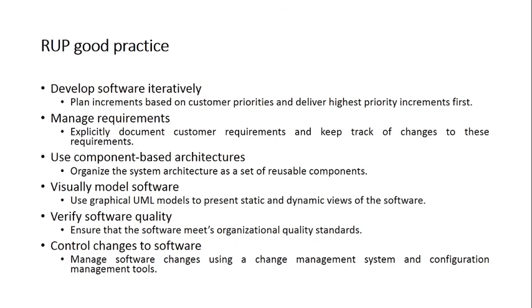So configuration change management is when you're making a change, the others have to stop, and once you complete your change, you have to update it in the centralized repository so that everyone is aware that some changes have been made and they have to refer to the latest version of the SRS document, right? So we have a process in place. We'll do this configuration management in detail in the 5th unit.